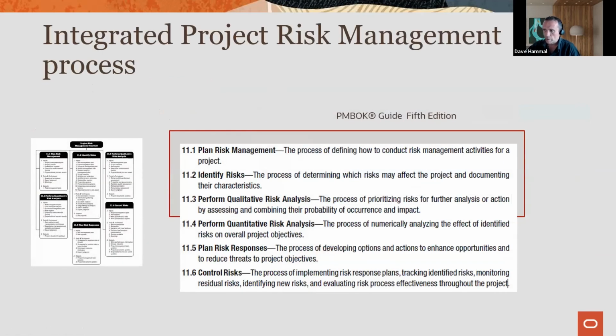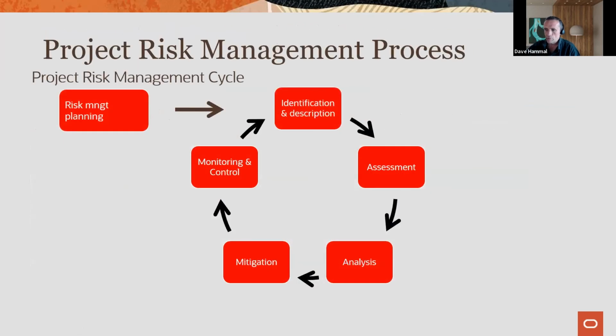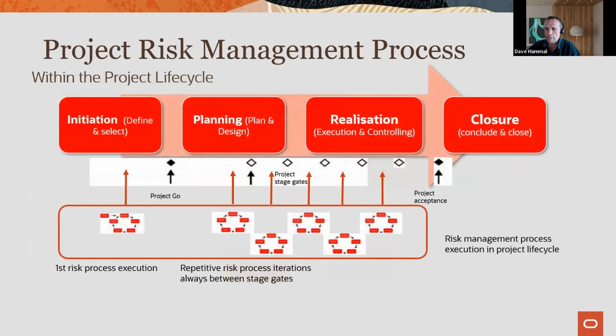We talked a bit about the risk management process already. That process is often cyclical and iterative, and it's carried out at different stages of your overall project life cycle. Certainly carried out, as mentioned, towards the end of maybe FEL 3 before you give your overall approval and give the go-ahead to fund and execute a project. Once you're in execution, revisiting that risk process is also pretty key, and carrying it out at a monthly or a quarterly cadence, or as you hit particular stages as you go through.